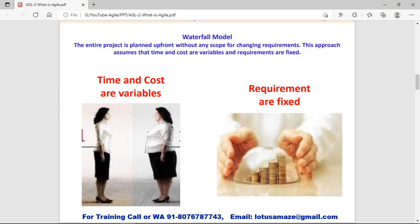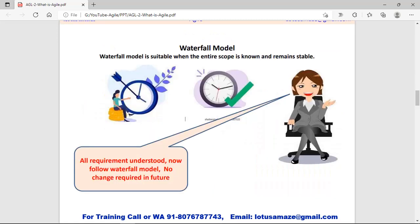In the waterfall model, two things are very important. Time and cost may vary, but the requirements are fixed. When we analyze the requirements, it is assumed that all the requirements are fixed. Once the project development starts, there is no change in the requirement. The waterfall model is suitable when the entire scope is known and remains stable — meaning you have full knowledge of the timing, duration, team size, and risk within the project. Then you can follow the waterfall model.